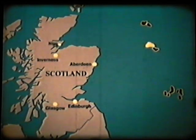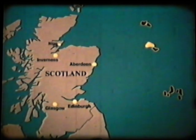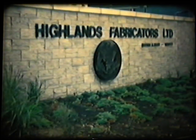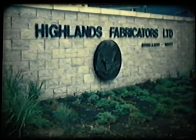Brown and Root were awarded the contract to design the structures. One of the first 2 platforms was to be built by Highlands Fabricators, a Brown and Root Wimpey consortium. The other platform was to be assembled by Laing Pipelines offshore at Graythorp in northeast England, where they faced the job of clearing and adapting an old dock, a considerable task.